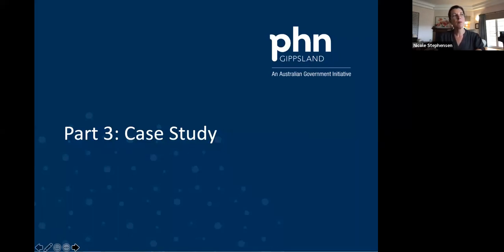External privacy impact assessments, though, they require something that often privacy doesn't get from a project perspective, which is budget. So at the privacy threshold assessment stage, which we'll talk about in a moment with this case study, it's really important to consider whether you need to add to your budget for privacy, or whether you're happy to run the gauntlet of doing the work internally, without giving that additional budget to privacy and potentially having that community concern remain present for you. So I hope that answers the question.